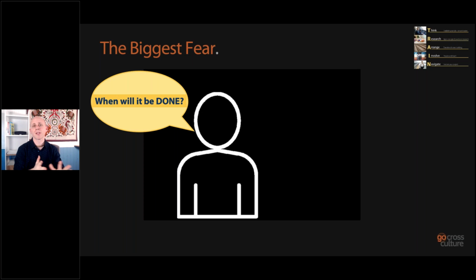But this is where you get the customer closely aligned with the project managers and get the customer's voice as the most powerful and influential voice, and the sponsor, because they have the overriding need. And if they're satisfied, then everyone else should be satisfied. So do the first few sprints as a prototype, get them in the flow of Agile, and then demonstrate continued delivery, and explain to the sponsor this is how it works, and keep educating the sponsor that it's up to them or the product manager or the product owner to decide when they're ready and what is the minimum viable product, as we call it. And that's customer collaboration.